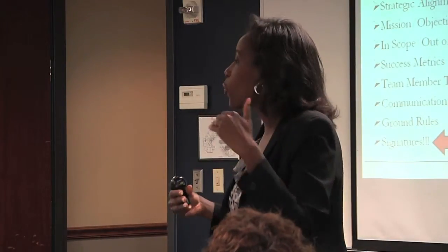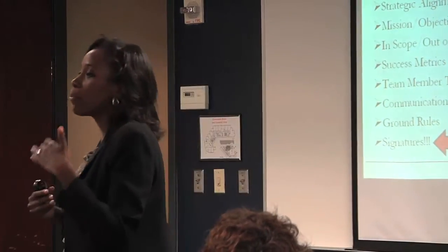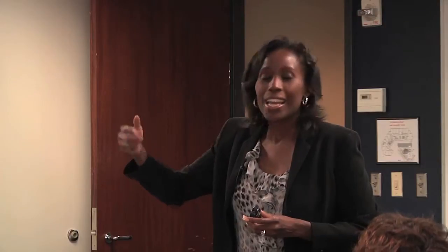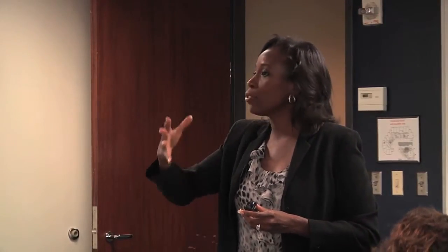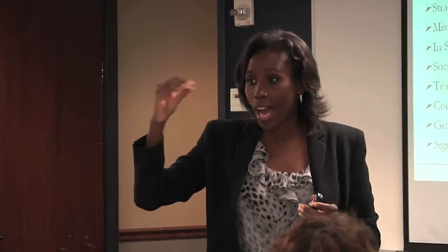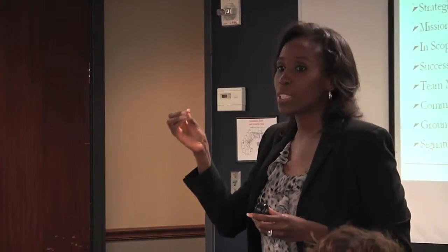So the new ground rule was, anytime you're sending out an email or communication where you really expect the person to take action, you must write "action" in the subject line and indicate what the action is. And then in the body of the email, you can go into more detail. Because aren't there people who are so lazy, they're not going to open up the email? They're just going to look at the subject. So you really need to catch their attention really, really quickly.